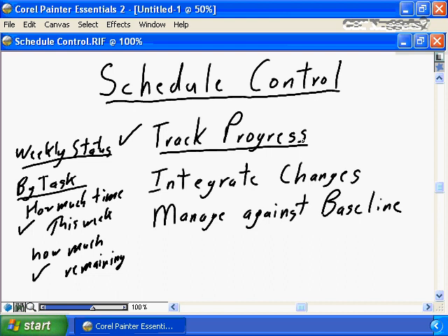That, again, helps accelerate the time if they know that you're happy with hours and that the hours are absolutely based on the best facts they have at hand. It's close enough. So insist on weekly status, insist on how much time per week, insist on how much time remaining per task at an hour level, not at a quarter or a half hour level, and within 2 to 3 weeks, the moaning and groaning will stop, and within 2 to 3 weeks, you will be getting the information that you need to track the progress on your project.